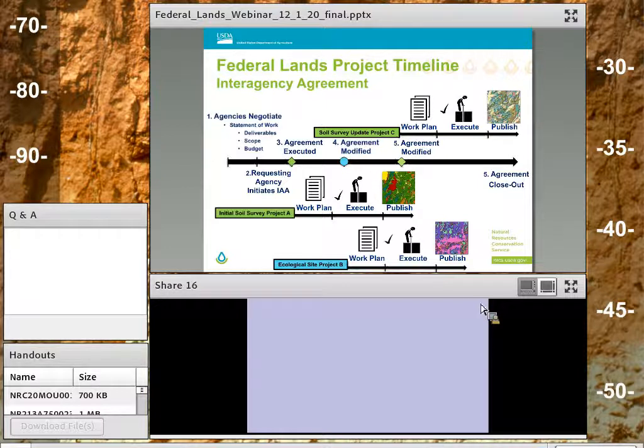And then after that, the MLRA staff that's servicing the area would draft a work plan to meet the deliverables and execute the plan following approval. So assuming we're able to build the agreement into a 5-year structure, we may be able to add multiple project priorities as shown here, and we can even entertain unique types of projects through a single agreement. And the multiple order structure allows us to field smaller budgets over multiple years with potential modifications.